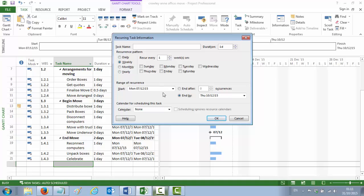So we went to recurring task — it's a weekly meeting, one hour, so we change the D to an H. It's recurring weekly on a Wednesday and ending after five weeks. Be careful that you put five here as end after five occurrences, not recur every five weeks. The difference is you'd have one this week and then not another for five weeks, whereas here you're saying every week for five weeks. So you put your number five and say OK.